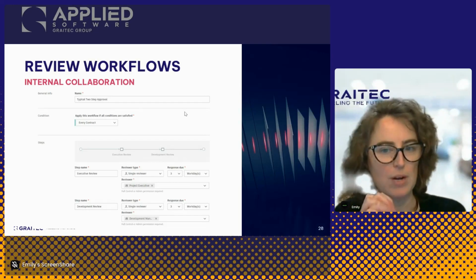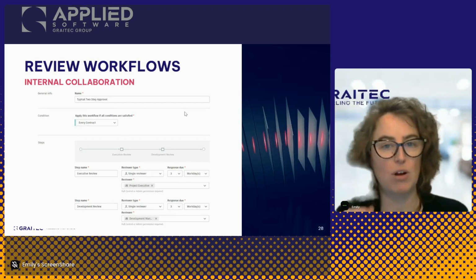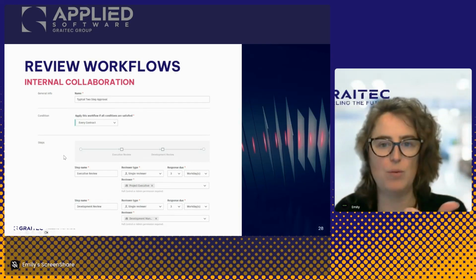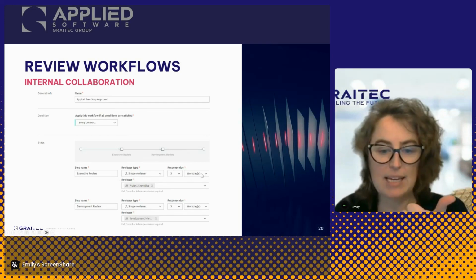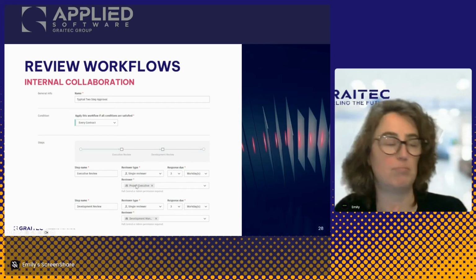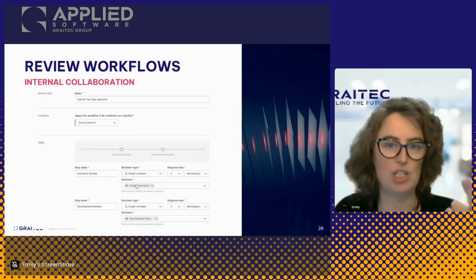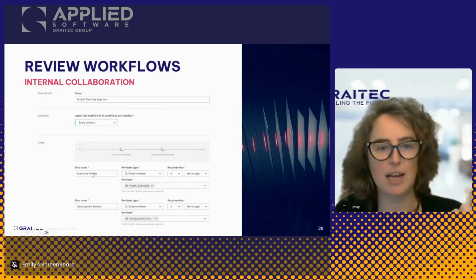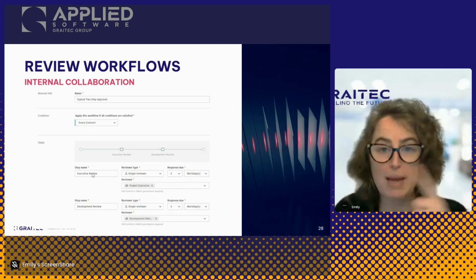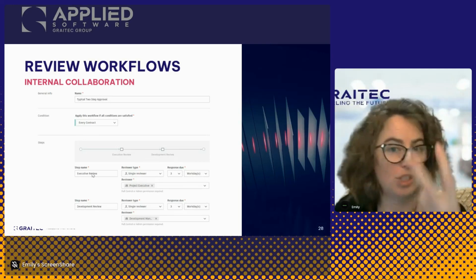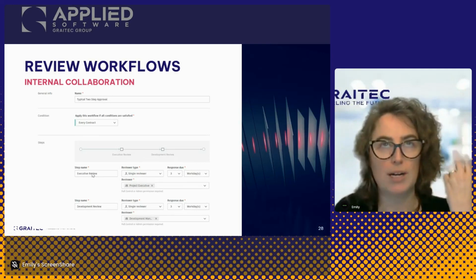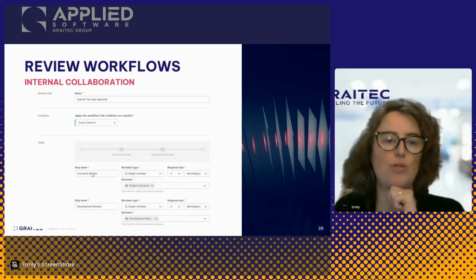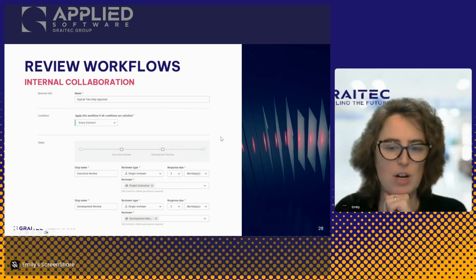I can set up a workflow that when I hit the send button on that contract, it goes to development and they start to review it. They have 3 work days to review it, and they say, great, it looks good to me, proceed. It goes on to the next person. So I mix these up, it goes on to the executive. Executive reviews it, can make comments on it, and otherwise proceed to another reviewer or approve it officially, and then it goes to the vendor or the supplier or the contractor on the other end.